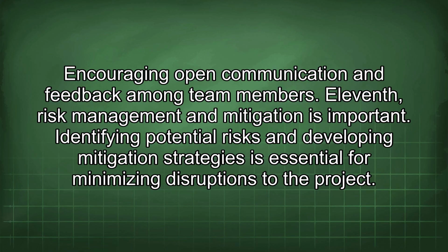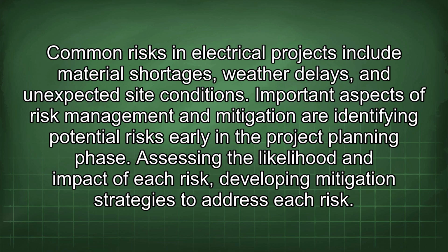11th, risk management and mitigation is important. Identifying potential risks and developing mitigation strategies is essential for minimizing disruptions to the project. Common risks in electrical projects include material shortages, weather delays, and unexpected site conditions.